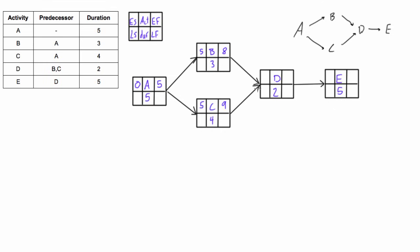Now where two activities converge onto one, we have to on the forward pass pick the larger value. Because activity D here depends on activity B and C, it can't start until activity B and C are both done. So if we started on the eighth day, activity C wouldn't be done yet, so we have to pick the ninth day. So we put the nine here and then we add two so we get 11. And then we bring the early finish again to the early start of the next one, so we bring the 11 over and 11 plus 5 is 16.